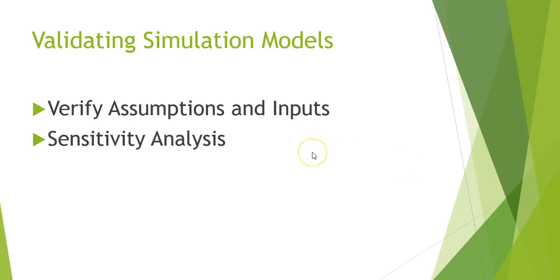Now, one caution is that when you're using a simulation model, you always want to validate the model. You have to verify all the assumptions and the inputs to the data, and you have to do a sensitivity analysis. So we mentioned that a minute ago. Sensitivity is simply what factors in your simulation affect the outcome and change the answer in different ways. What has the biggest impact on the answer? What has the littlest impact?